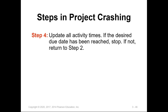The fourth step: update all activity times. If the desired due date has been reached, stop. If not, return to step two. So we crash an activity, check feasibility and minimum cost, then look at the overall project duration. If the goal — say finishing in 14 weeks — has been met, we stop. If not, we identify another activity to crash and continue until we reach the required due date.